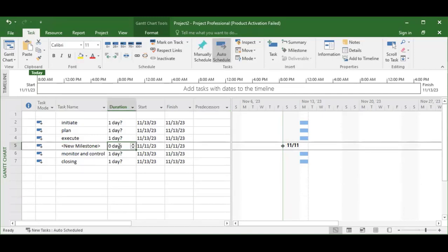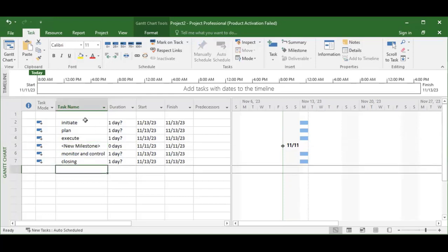In our chat, it was asked, how do you make an activity a milestone? It is by changing the duration to 0 days. What does that mean? A milestone is a stage in your project where something is accomplished. So it's not usually an activity as it were. When you want to build and you've gotten your foundation sorted out, at the stage where everything is complete, that is a milestone. So usually when you have a phase, at the end of that phase, you can say foundation complete. Then you put the duration as 0. So that is a milestone.